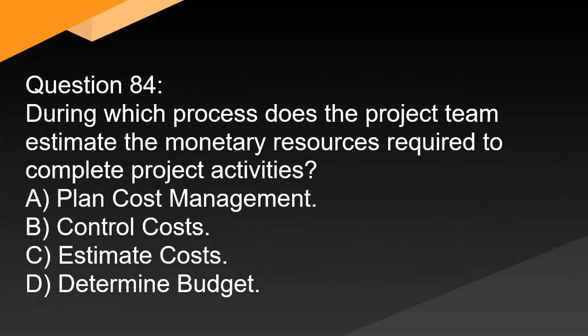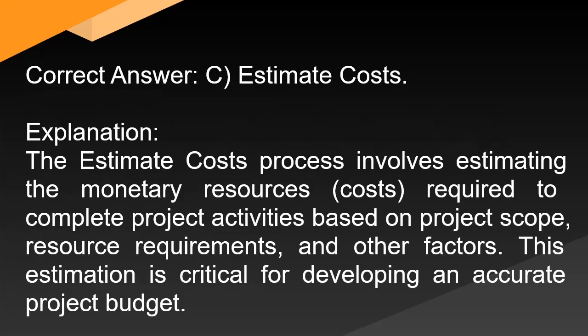Question 84: During which process does the project team estimate the monetary resources required to complete project activities? A. Plan cost management. B. Control costs. C. Estimate costs. D. Determine budget. Correct answer: C. Estimate costs. Explanation: The estimate costs process involves estimating the monetary resources (costs) required to complete project activities based on project scope, resource requirements, and other factors. This estimation is critical for developing an accurate project budget.